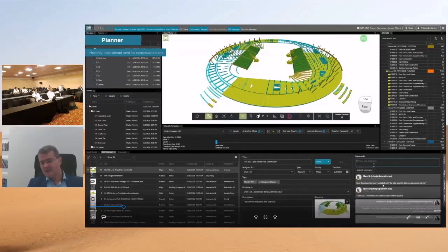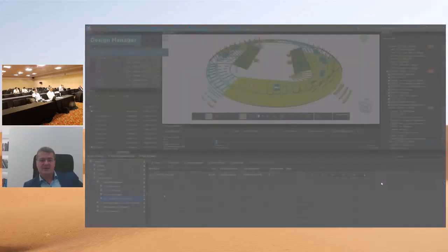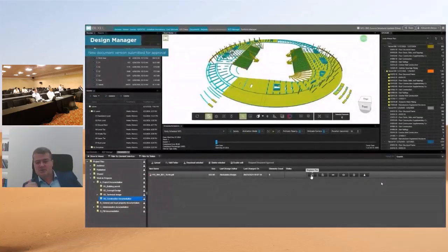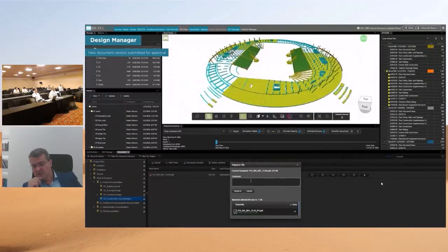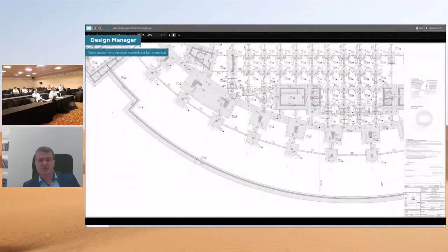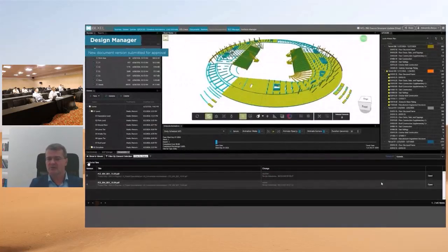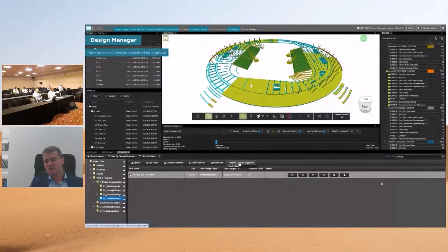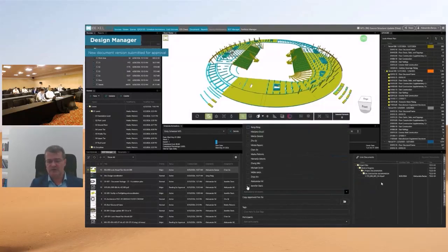So now when the field engineer sends this request, the design manager is invited to upload a new version of the document to the site. You see the entire history of the previous versions. You know when this was updated. So if the works are wrongly executed, you know if the contractor already had this information or not. And now the design manager starts the document approval workflow.